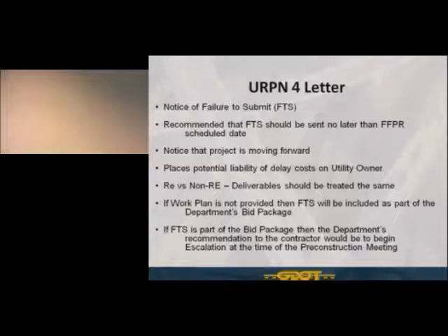On the flip side of that, historically, you've been late on a deliverable and told the department you needed another week or two, but 2 months later you still hadn't provided it, and this had occurred several times, then we probably go ahead and submit that FTS letter to get it documented that there's a potential for a delay to this project due to whatever reason. So just keep that in mind as we try to move forward working together as partners and building relationships. And also keep in mind that the utility owners had a say in this entire process. So y'all have been part of this process. So again, the FTS letter is a notice that the project's moving forward. We're not going to delay it due to the non-deliverable. It also makes you aware that under state law any potential financial liability of delay costs could fall on you as a utility owner.